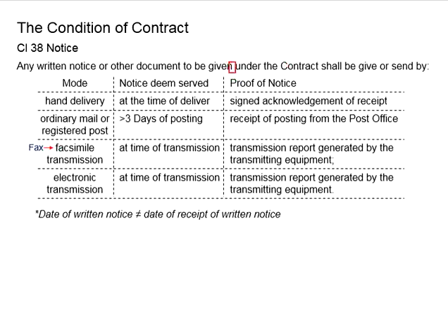There should be evidence to show that they have received the written notice. This is regardless of whether they read through the written notice or not. We also mentioned in our previous videos that the date of written notice is not the same as the date of the receipt of the written notice.